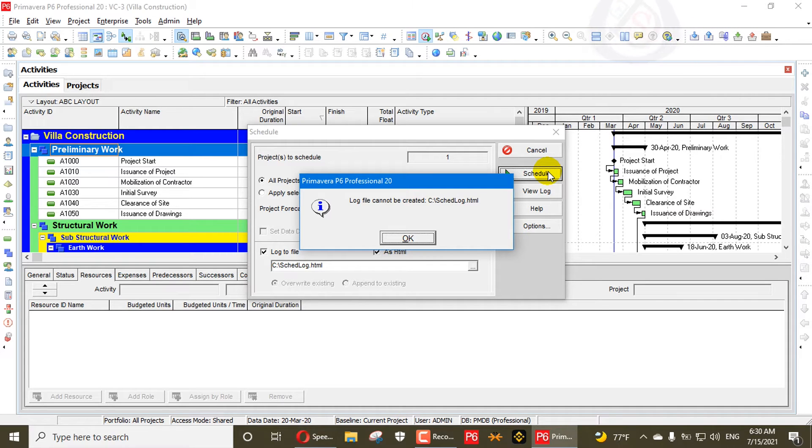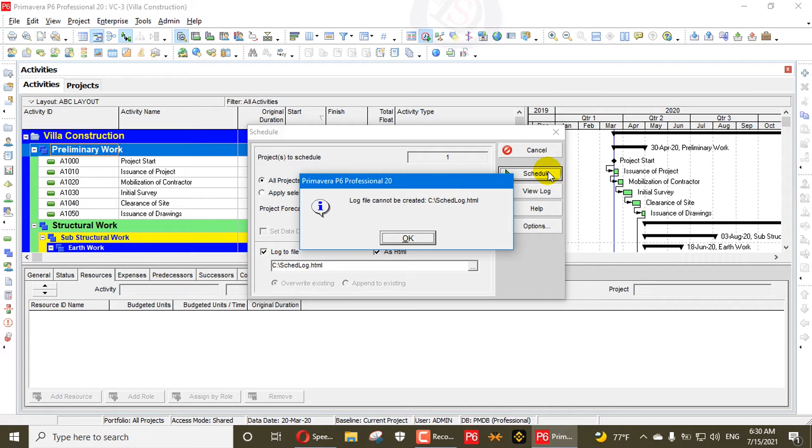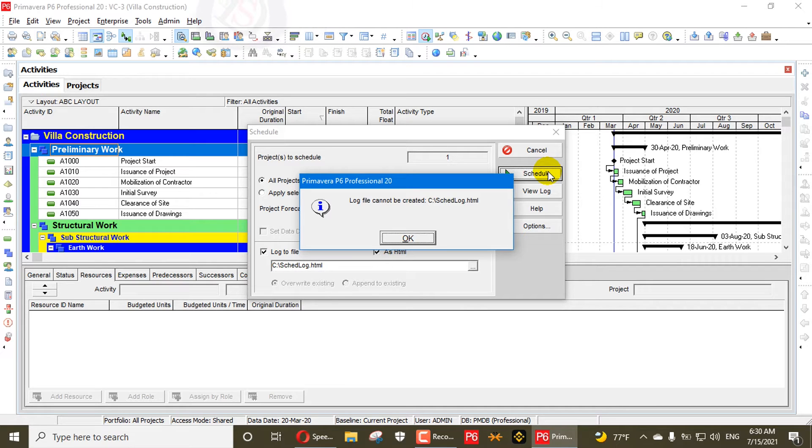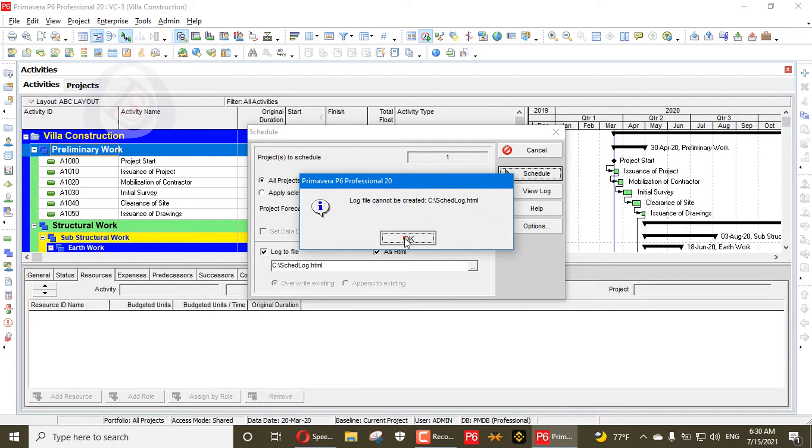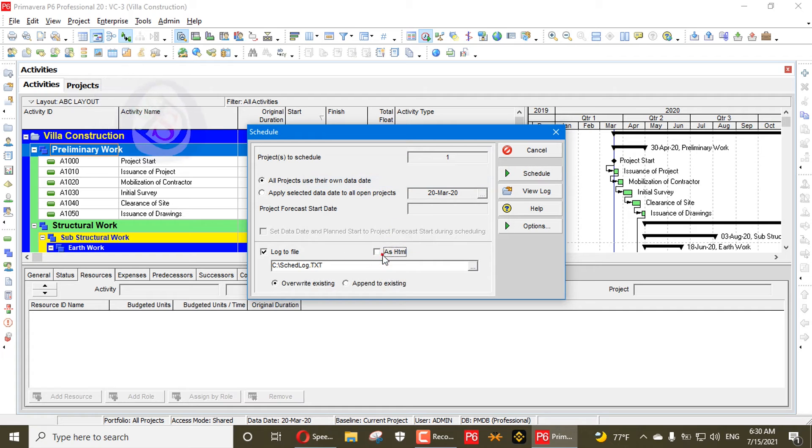It's obviously a new system if you don't create the log file. You can schedule, but why do we need the log file? The log file is a file which has all the data during your scheduling. It will show you all your warnings, predecessors, successors, and all details of your schedule.